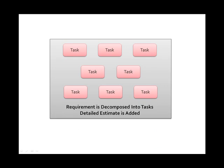The first step in development is the breakdown of a given requirement into tasks, which are placed in Team System and assigned to team members. This happens in parallel with any necessary design, and the result is a set of tasks that define a requirement.